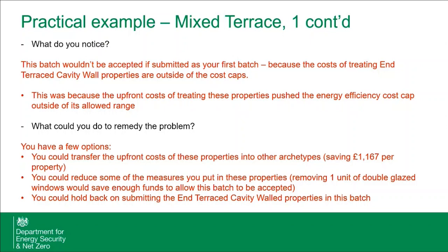Yes. So where you have clean heat that's not the standard ones, so not like an air source heat pump. So for things like ground source heat pumps, combined shared ground loops, biomass, I guess, in some instances. So where you have those non-standard complete heat measures, where you provide justification as to why those are more expensive, yes, you can borrow from your energy efficiency cost caps.